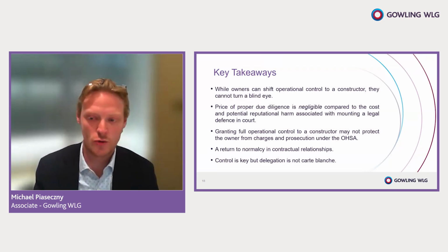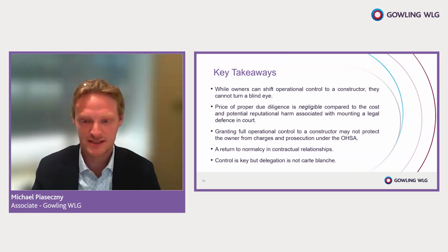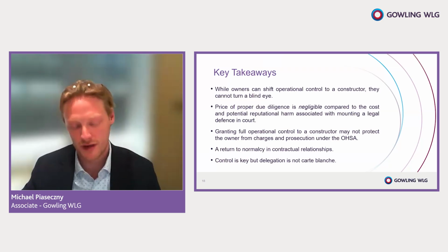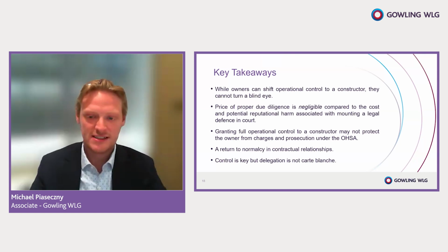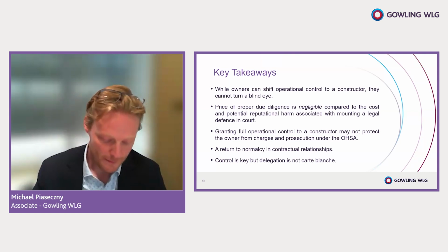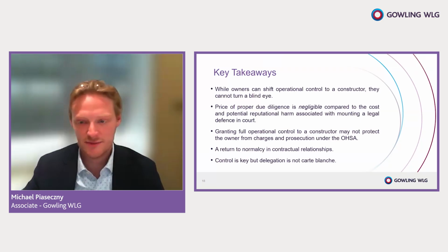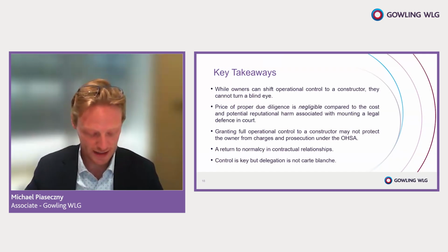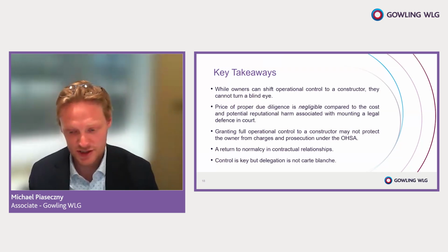And that decision of the Ontario Court of Appeal now is the final word on that. It solidifies that due diligence can be established when you cede that control. But you must be able to demonstrate that you entrusted that work to a qualified constructor. And again, delegation is not a free pass. The city was able to defend itself because it selected a contractor with experience, because it reviewed safety records, because it maintained oversight, it sent in quality control personnel. You still need to take those proactive steps. So again, delegation is not a free pass, but it certainly helps.